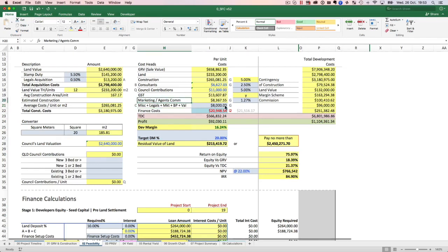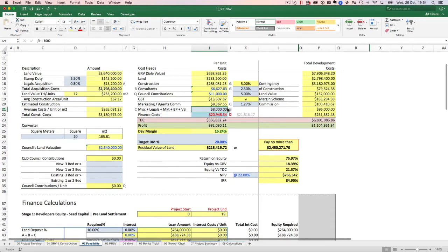For example, this is only the commission that you will pay to the agent, but anytime you list something on realestate.com.au, they charge you a listing fee, or the price for the hoarding that goes outside the site. You have to go and get a building permit, or you have to go and get a valuation. So I know that I've allowed about 96,000 for it, and my past numbers have told me that this is more than enough to allow for, and they will cover it.